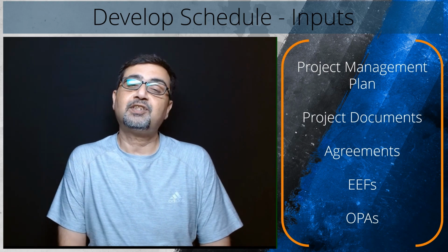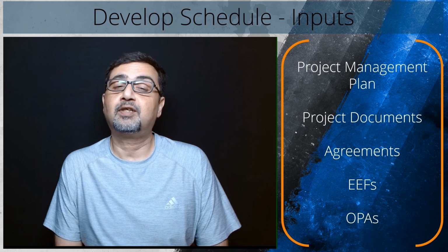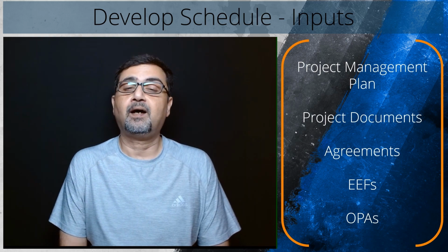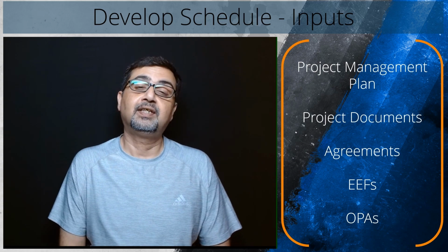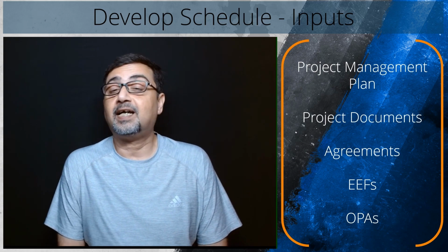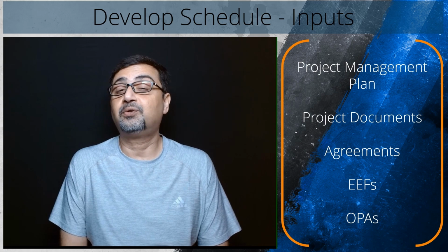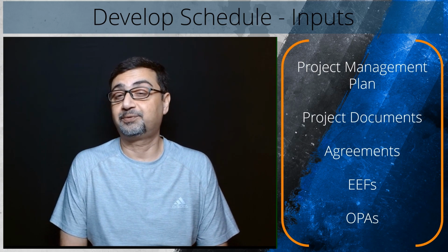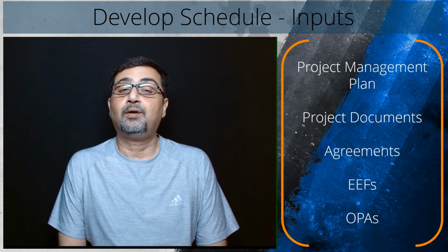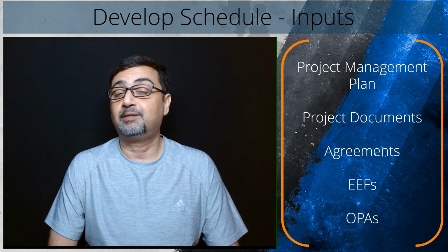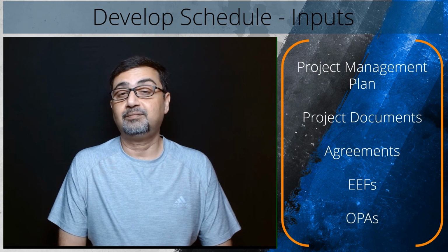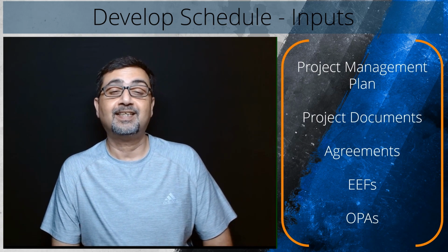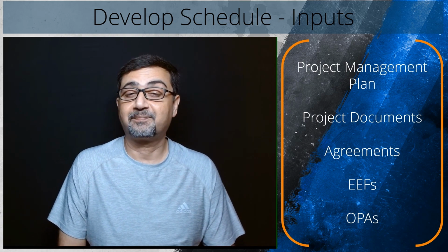Typically, the project documents which are included in the develop schedule input are activity attributes. The information connected to every single task on a project schedule is known as activity attributes. They offer particular details like task numbers, details, antecedents, successors, needs for resources, time limits, and limitations.